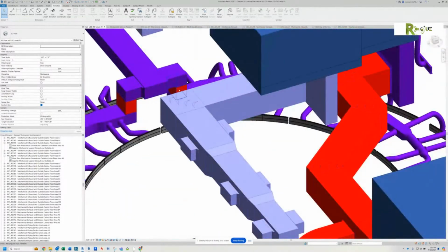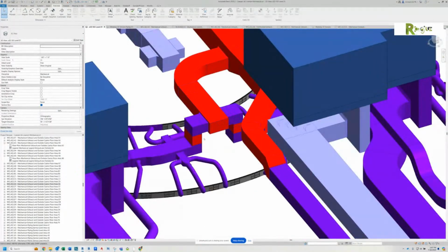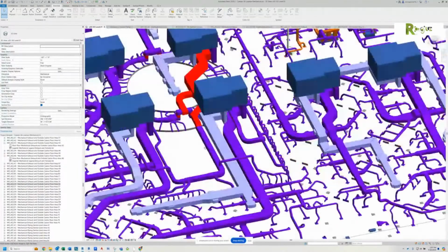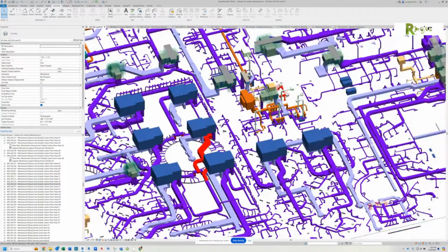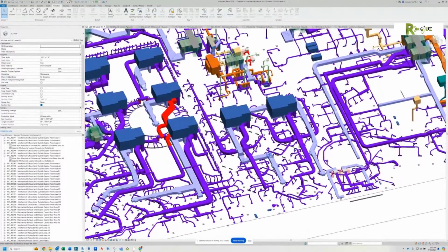And then I ended up including these two pieces here because this went lower, correct? Yeah. So we need these pieces to be a little bit longer. This would be the same, this would be the same, but these two would grow. So I highlighted those. Yeah, we have not been doing that on the low rise. No, I understand. I'll turn the filter off. This is just for me to make sure that I capture it all as far as the Rev 13, we can change it to whatever you want to name it. Yep. So I'm trying to figure out again where was that duct you were just? It's way over on the right side of the screen.